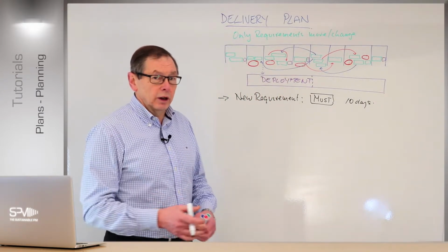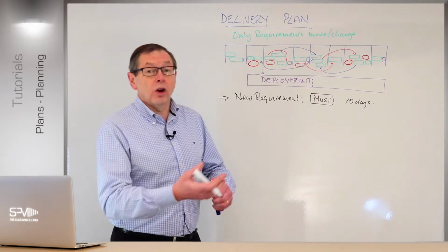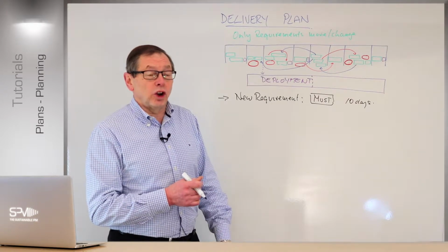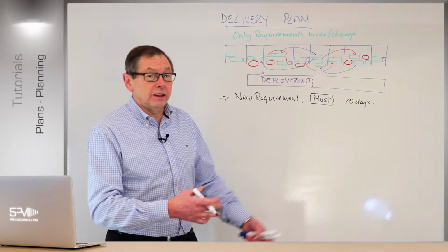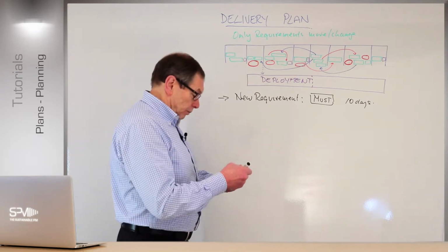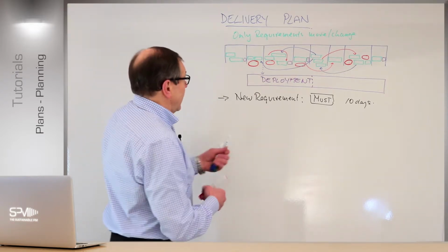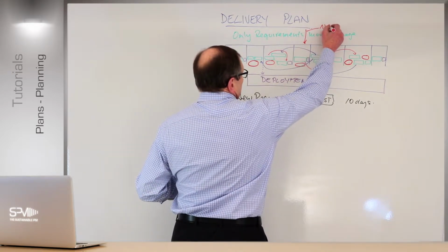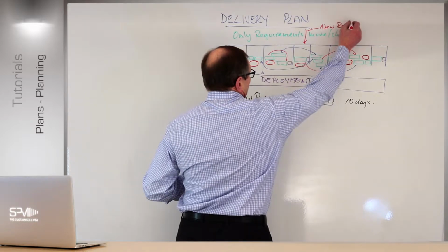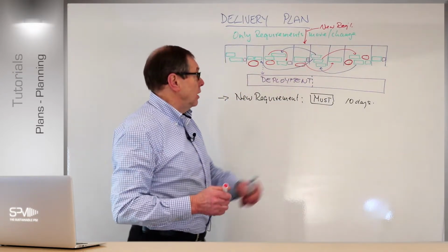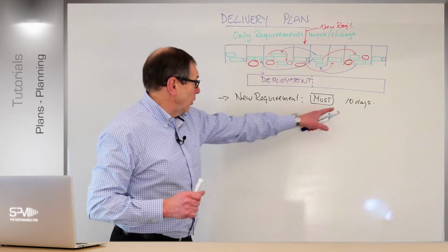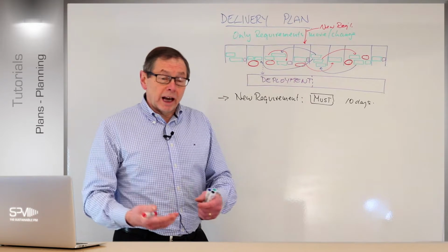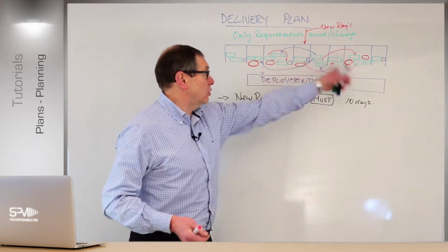Overall, it's quite a piece of work. Like on a website, I want to suddenly put in secure online payments, for example, or I need to add a new section to my application document for special cases or something. Now I need to add that in. So let's assume, for example, that happens around about here, right? So the new requirement comes up, and you sit in a workshop and you work out initially what it is, and therefore how long it's going to be, and that requirement is something they decide they want to put in. So now you've got to find out how you're going to schedule that in, because at the moment you can't impact too much on the plan.